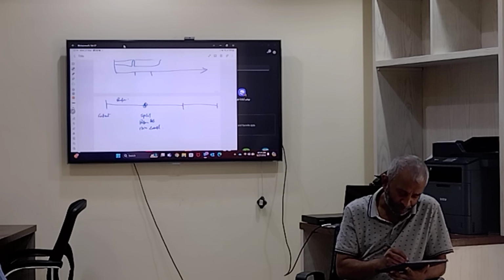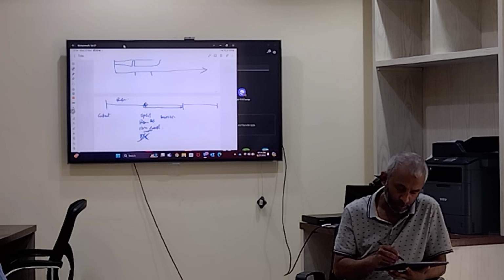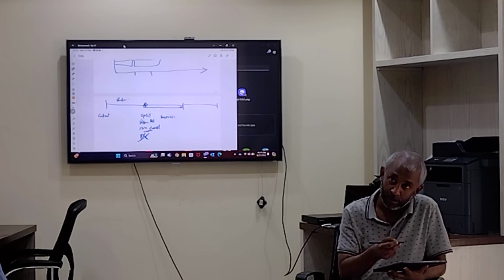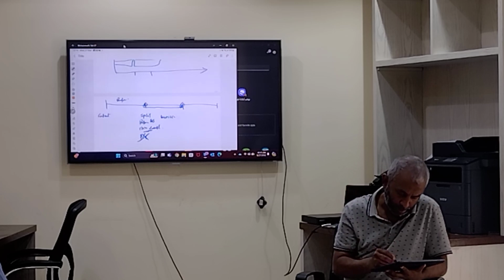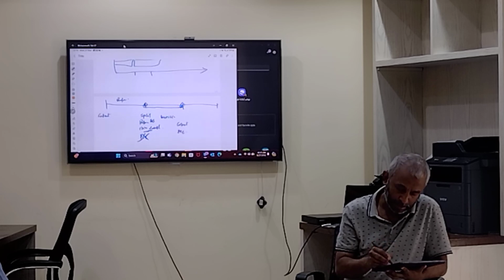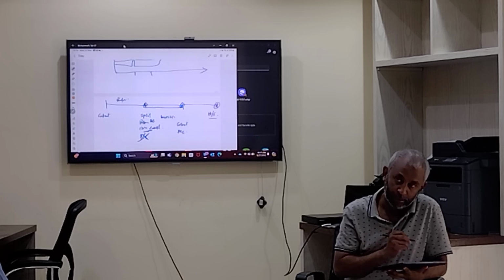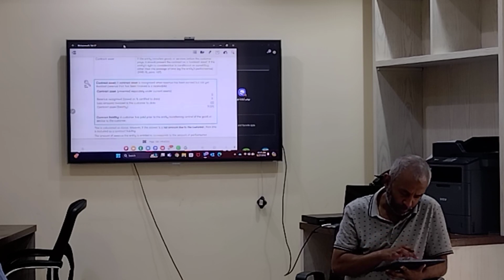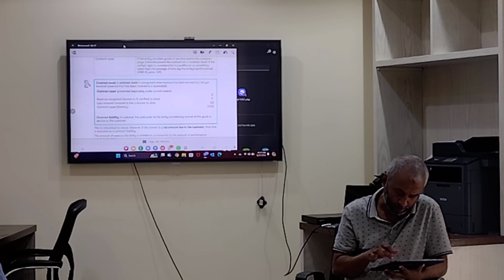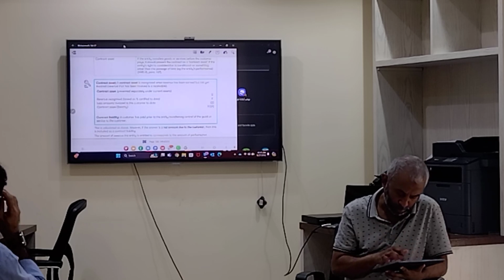And then after you start invoicing it, from this point it will not go to P&L. So you invoice it, every single invoice will then take you to the profit and loss account. And then here you have contract receivable, and then here you will show it in the balance sheet. Understand me? So, revenue recognized based on the percentage certified to date minus the amount invoiced to customer to date